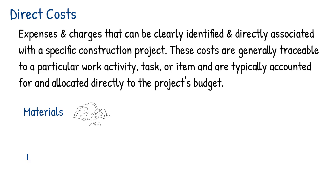Labor: wages, salaries and benefits paid to workers directly engaged in project activities, including construction workers, subcontractors and site supervisors.